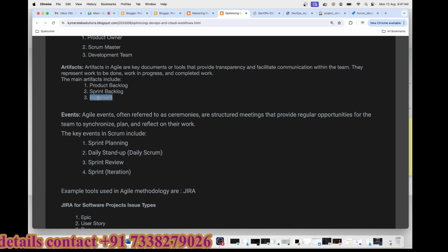Okay, after completing the first sprint, after completing the 10 requirements, the second increment will start, where we will be taking 11th to 20th, based on the bandwidth, based on the availability of the developers, based on the existing features and the size of the feature. If it is taking more than 1 week or 2 weeks or 3 weeks, then you have to assign that particular feature to one particular developer, and you have to give enough time.